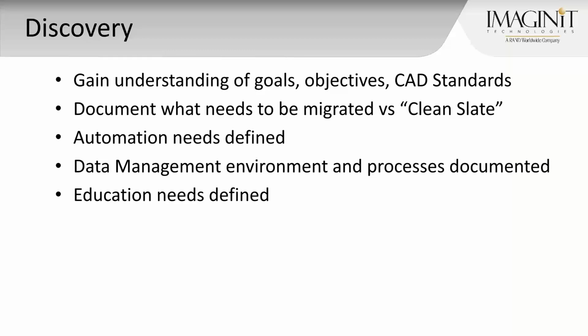And then the education needs to be defined. Typically, we don't do the education up front. We wait until we get down to the process and closer to the system being turned over for usage before we do the education, so that they can get some hands-on experience once we have the environment up and running.